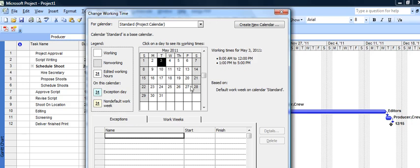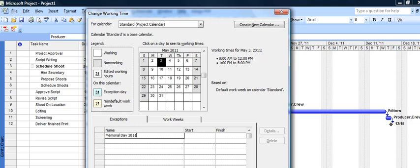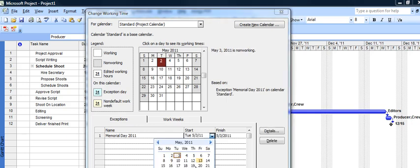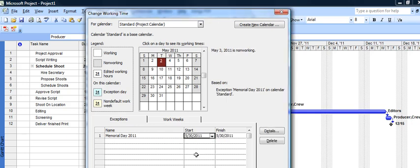But what we also want to do is recognize that there's some holidays in here. So like May 30th here would be Memorial Day, so we're going to set up a holiday called Memorial Day 2011, and that will actually occur on May 30th. So now that's set up and it's grayed when I move out of it.